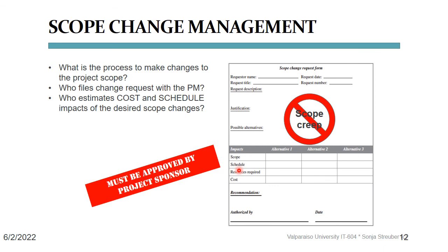At any rate, the functionality that is being evaluated for inclusion into the project can only be worked on if the change request is approved. If the change request is denied, well, then it may need to be revised or resubmitted, or perhaps rescheduled into a future release.